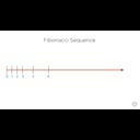In particular, the gaps at the beginning of the sequence are smaller, but they start to increase exponentially as the sequence progresses. This increase is very advantageous for our purposes of estimating complexity because it helps to convey that the complexity of each item, and therefore the inherent unknown associated with it, increases exponentially as the item grows larger. You'll also notice the question mark at the end of your decks.